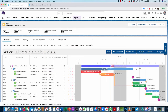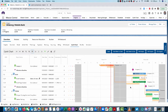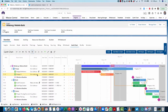What we're looking at here are the actual dates we're working to. If you want to compare how you thought the project was going to go versus how it actually went, you can toggle on the baseline view. You can see when you first scheduled the project, for example one action was planned for three days and held to that, while another was started a day earlier but took two days versus the planned one — giving you a lessons-learned view to take into future projects.